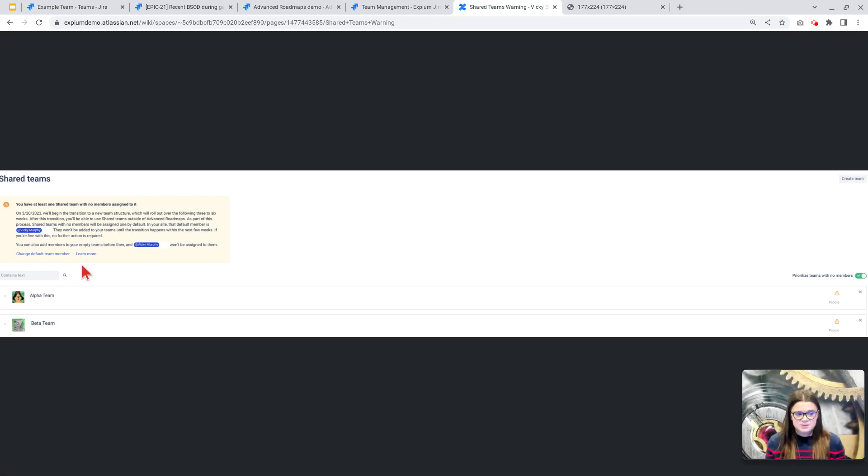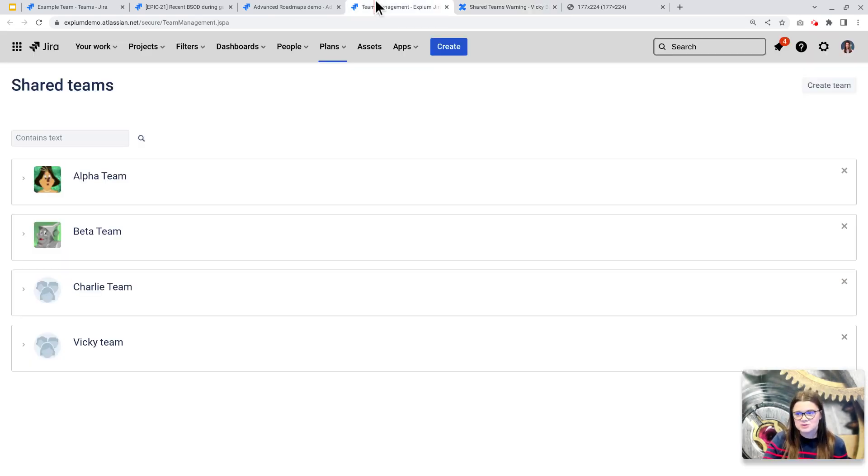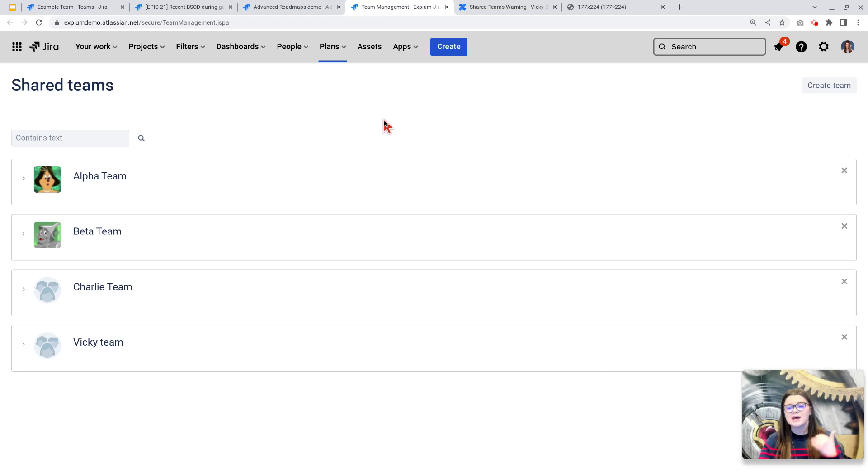As this rolls out, any shared teams that you have on your Jira site will automatically be added as a Jira team. One thing to be aware of, duplicate teams will not automatically be merged. So if you have any duplicates, you may need to do a little bit of cleanup.